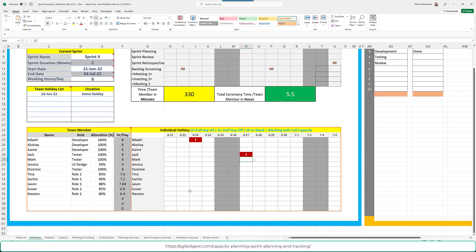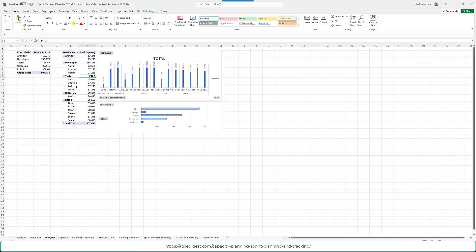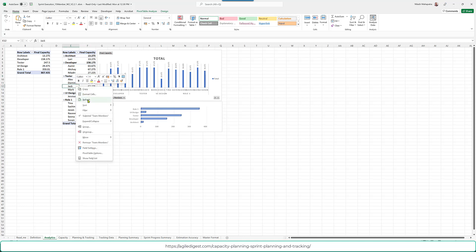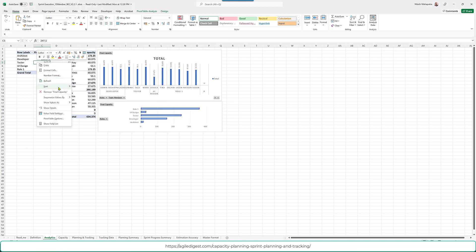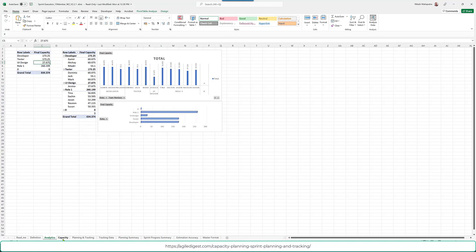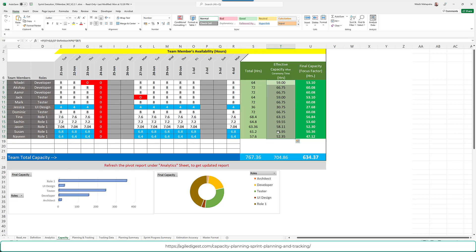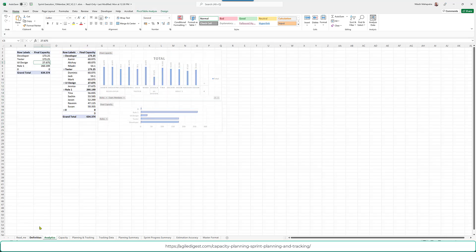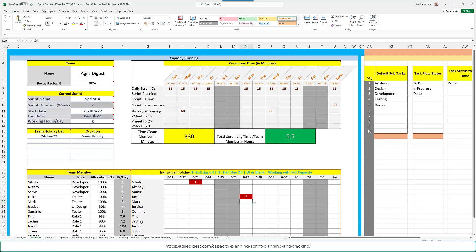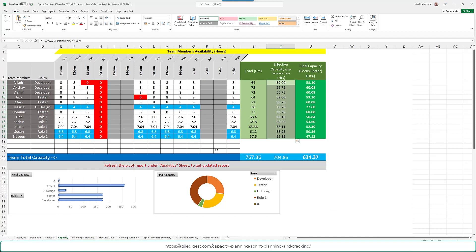If we go into the Analytics section, this is used for graphical and analytical purposes. After refreshing, the final capacity is calculated for the number of people entered based on their roles — it shows role-specific charts. It deducts total hours for all ceremonies and events, then applies the focus factor — in this case 90% — to show the final planned capacity.